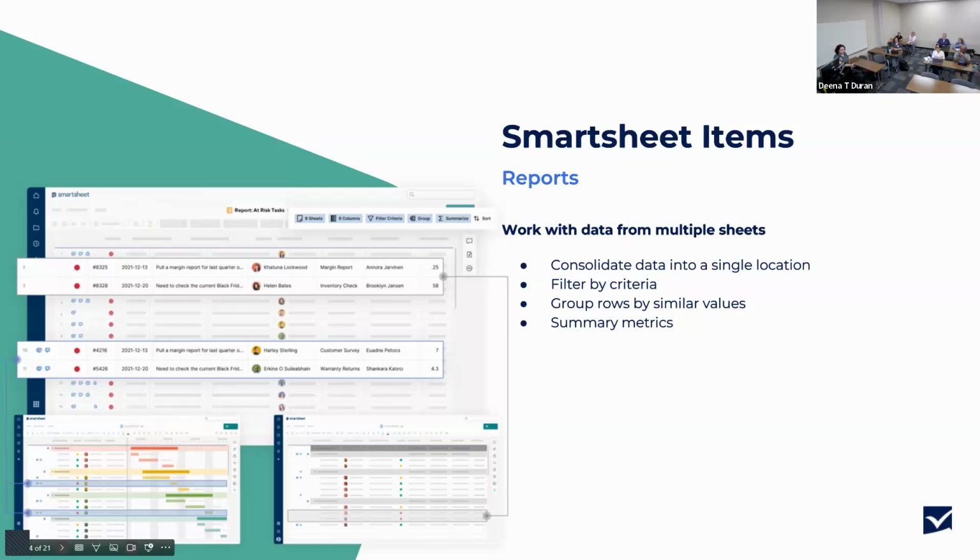I have a report that's reporting the entire workspace, and I'll show you how that looks when you are selecting that. But I have filters set up in order to do that. My filters specifically look at the name of the sheet. If the sheet name says it contains project schedule, then it knows to pull that sheet. And so now all of a sudden it's only pulling those project schedules. So now instead of 500 and something, it's going to pull 50 or 60.